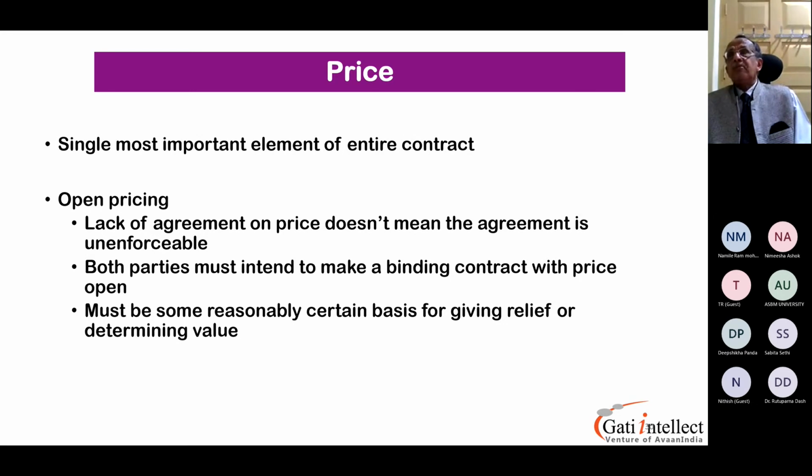Like what we have seen yesterday or day before, certain contracts like cost-based contract, you cannot estimate all the cost at one go because you are dealing with very highly expensive items, like building a ship, which can take 5 to 8 years or more, or aircraft which is being customized.